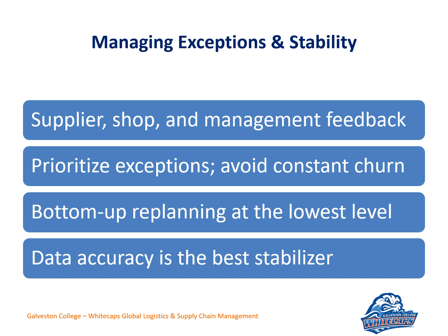Where did they get the 6 days from? Well, they were looking at a chart that showed human touch time. Not much touch time, but all the queue times, the wait times, the overnight heat times that we had to do for certain parts of the manufacturing process took 6 weeks. One heat test took an entire week on its own. So it was a big problem that no one had ever looked at, which I don't know why.